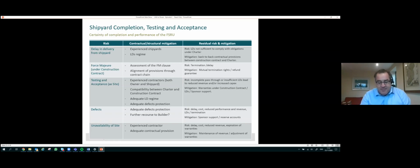But ultimately, the biggest risk in the interface between the FSRU and the power plant is the unfortunate scenario where, once installed at the project site, the FSRU is unable to satisfy the minimum acceptance criteria, despite the FSRU sponsor's and the builder's efforts to rectify the defects. Now, the Charter will set out a long stop date by which the FSRU will have to satisfy the acceptance criteria, or the project will have the right to terminate the Charter.